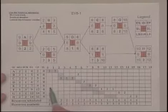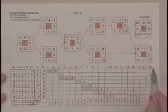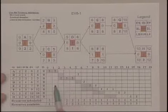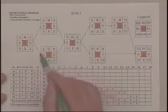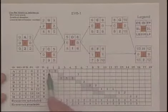So here we have our first resource constrained project. And as I pointed out, it has been extended from 12 to 16 weeks. The other thing that's occurred is look at the slack in the revised schedule. Remember, before we introduced resource constraints, we had one critical path. Now, if you look at how it's set up, a delay in any one activity would cause the project to take longer than 16 weeks.